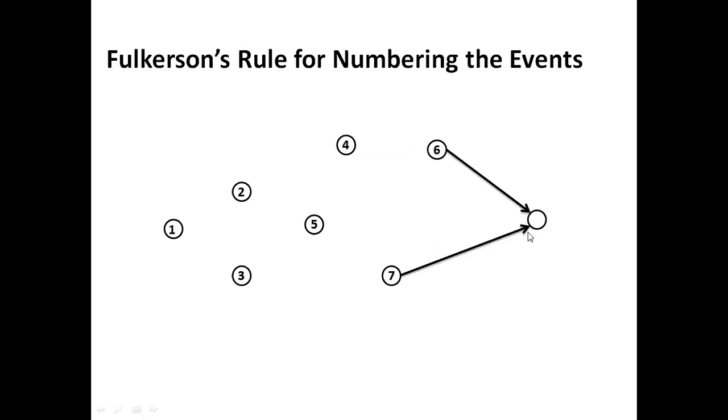And like that you have given, and last, the terminating or the final node is this one. It is called the final or the terminating node because it has got only incoming arrows. There are no outgoing arrows. That is why this is considered the terminating node. And let us give the last number, that is, after 7 the last number is 8. Okay, this 8 will be given to this. After removing this one, it will be given like this.